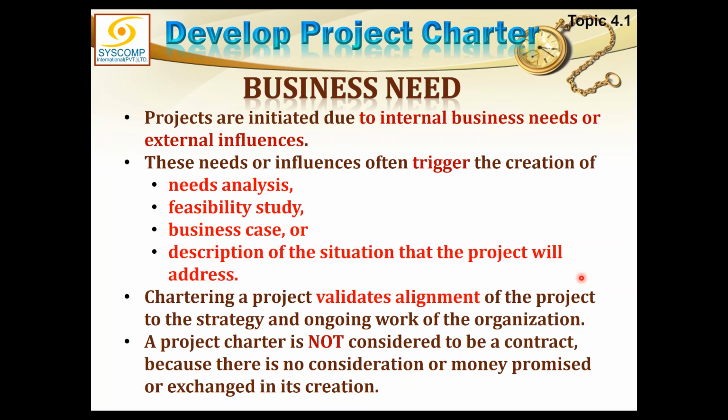And once the business need existed, only then we developed a business case out of it. We did the need analysis, we did the feasibility, we created a business case and description of the situation that the project will address. So once all that has been validated, the project can only be chartered after that.